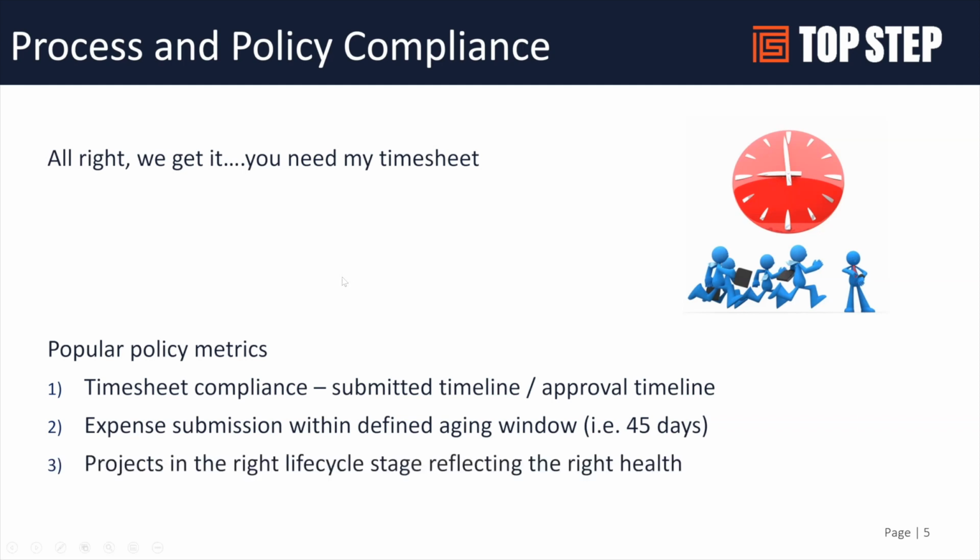So let's talk about projects, right? In OpenAir, you define what stages projects live in. Generally, organizations will create a planning stage, an active stage, a closed stage, maybe there's an at-risk stage, and are your projects moving along as you would need them to? Or you have projects inactive that should be closed? Do you have projects in planned where people are putting time in that really should maybe be at risk because you're missing a contract element?